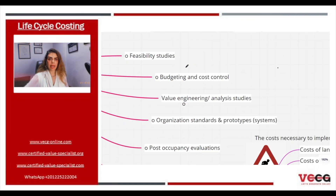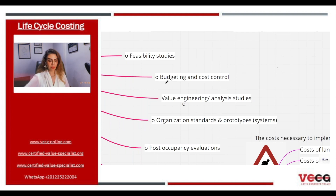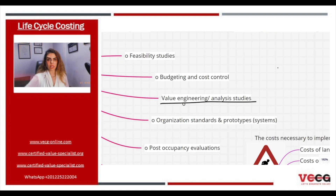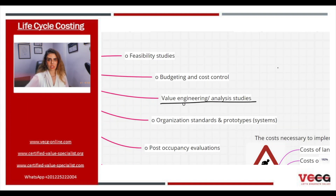When LCC is applied — for feasibility studies to compare if a project will be feasible or not, for budgeting and cost control, for value engineering and value analysis studies as well. To set organizational standards or to compare new prototypes or new systems, it will be great to use the life cycle cost as a tool to highlight the difference between different alternatives, especially regarding cost.